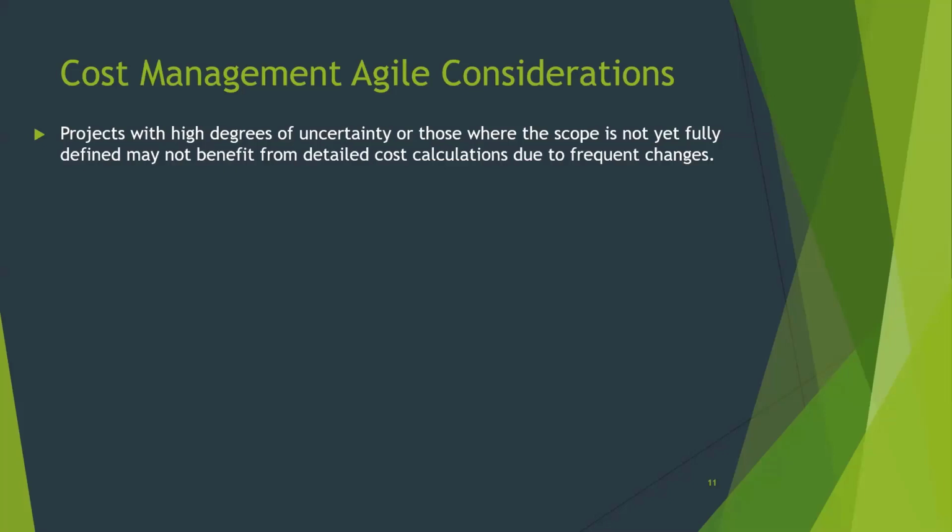management. The thing that you will have, though, and need to be responsible for managing is, even though it's an agile project, you're still going to have a budget associated to the project that you're going to manage. If you have external expenditures, as you issue purchase orders and get invoices against your project, you're going to have to track the actual cost of those external expenditures versus your budget.